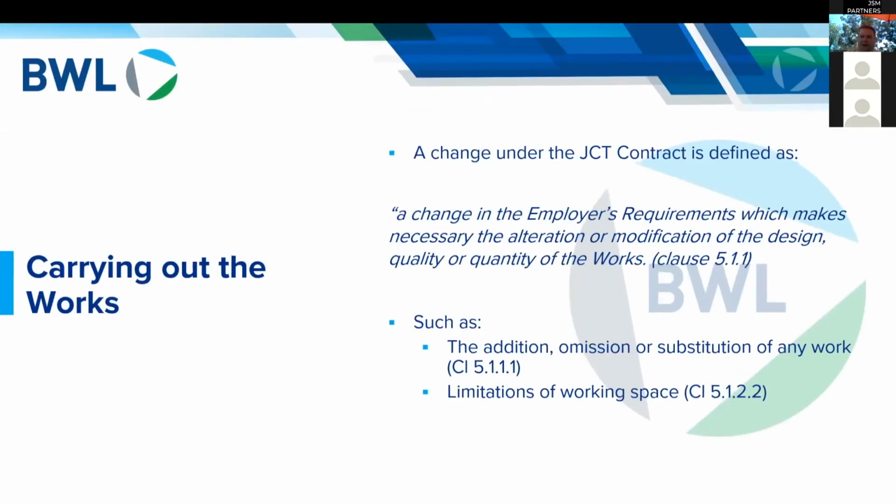So change is catered to predominantly in part 5 of the JCT design and build contract. And we've got the definition in clause 5.1.1. So a change in the employer's requirements which makes necessary the alteration or modification of the design, quality or quantity of the works. So it's exactly what I was saying. Are you adding, subtracting, or merely changing? And again, it goes on.